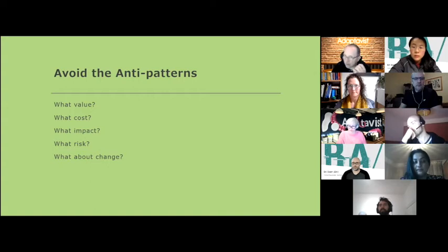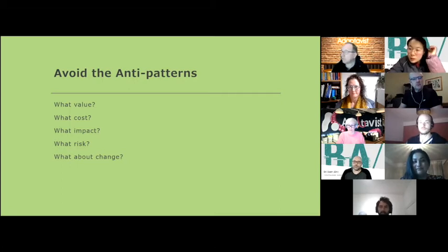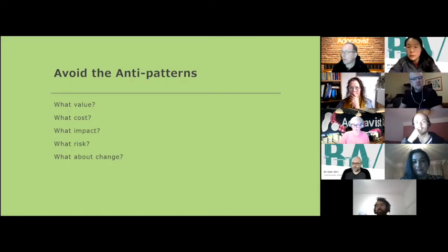But like I said, what's the cost if I don't define the detail of this? Let's say I'm looking at an integration between two systems. I may need to specify in great detail what that integration looks like and get agreement with that partner. So you've got an objective there to make sure you deliver it, because the impact of not doing that is huge. You could get to the point where we're going to build this integration, and everybody sits down and goes, okay, so what are we building? Oh, we can't do that. So there are times when you need to do that.